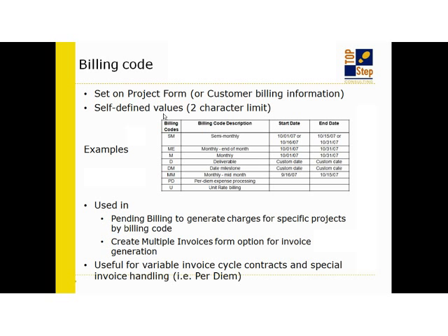So when I go to generate the invoice, if I run it based on travel split or TS or whatever you call that billing code, I know any invoices generated from that batch need to have one extra step because I need to separate those out. So you can use billing code for whatever you need. That's part of the problem why I don't think it's used very often, because it is completely a blank slate and you have to define it.